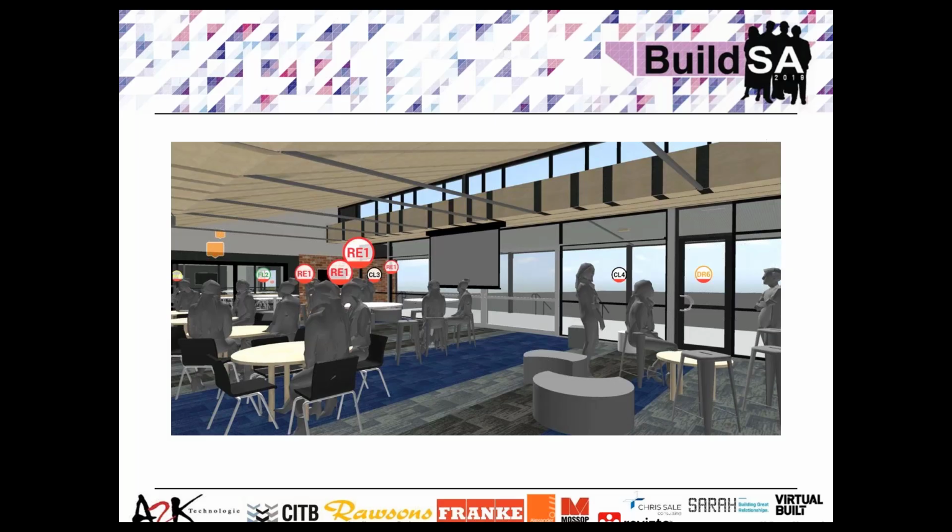That's okay. But the other downside was, if I want to get that data out of Revizto, what it loses is its understanding of where it belongs, not in a three-dimensional space, but what it can't say out of the box is, right, this issue belongs in a room, whatever, on level, whatever, in building, whatever, right? And so a lot of contractors and also clients want to say, sure, this issue is great, but I operate in a space-based environment by room name or title or building or asset or whatever, okay? So our issue was, Luke, how do we get this data that was really helpful out of Revizto and tell it where it belongs, right?